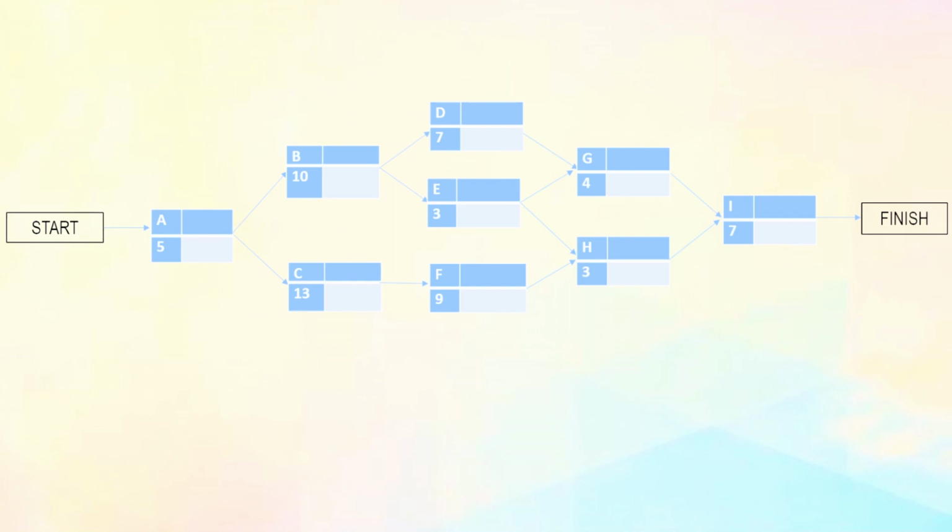But first, let's create the project's activity schedule. Here are the procedures that should be followed in performing critical path method networking. Construct a project network, perform forward and backward passes, determine project completion time, calculate slack values, and finally state the critical path.